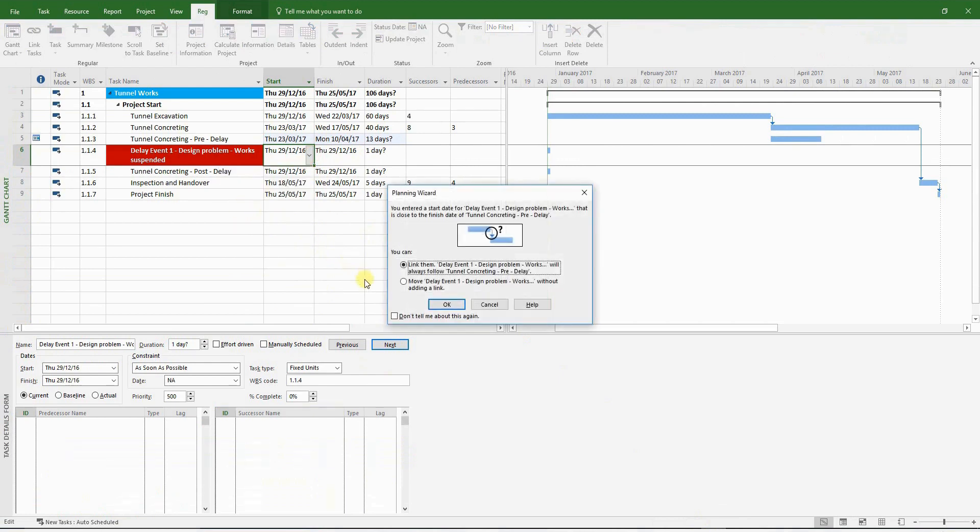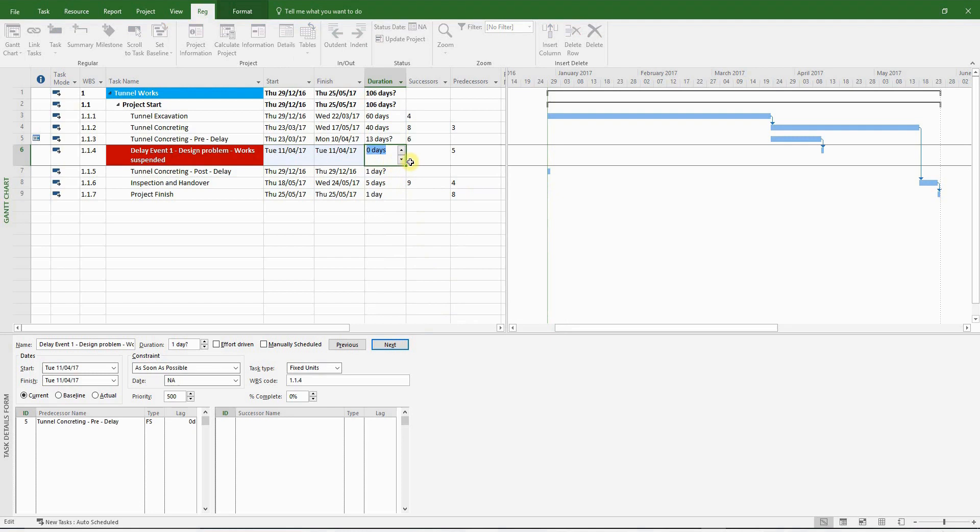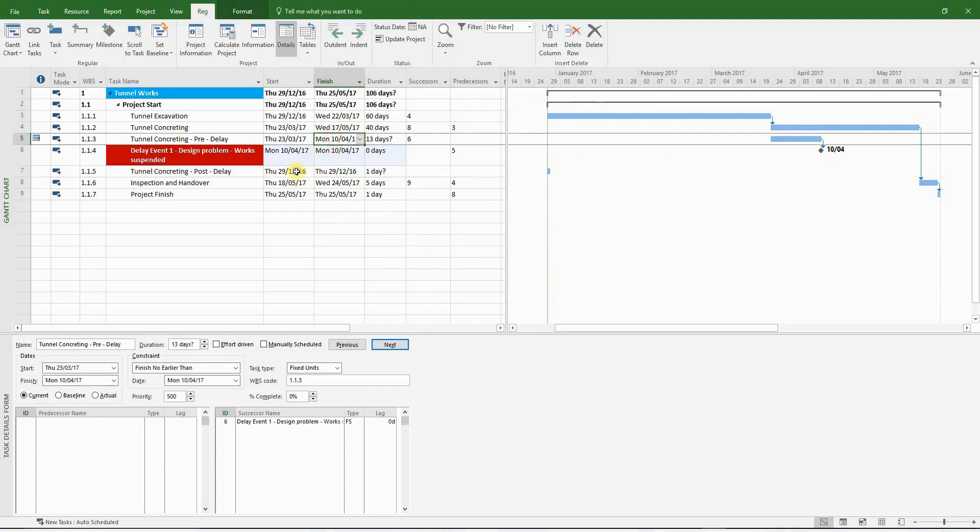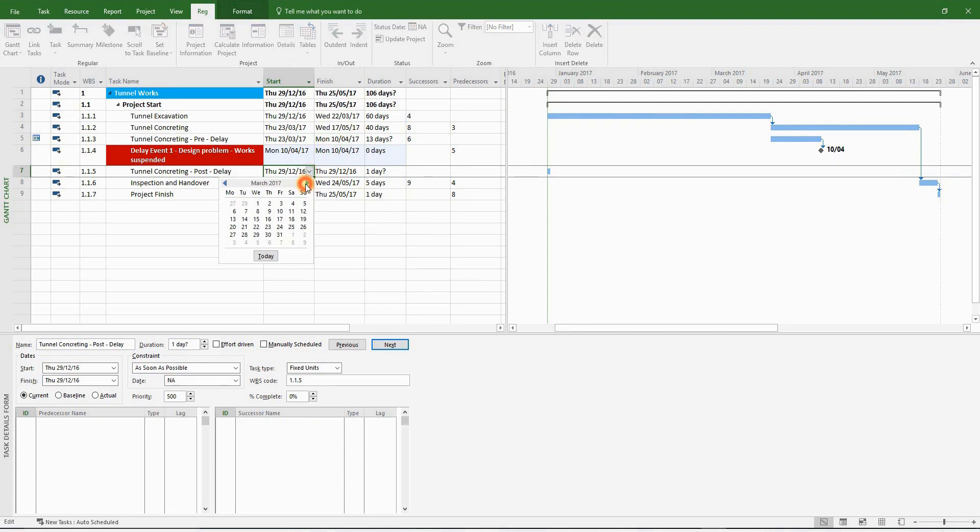When you see this pop-up menu, please make sure that you click OK to the first auto-link option. This is just how MS Project works. You have to be extremely careful and cognizant of these pop-up menus. For the moment, I'm going to convert this delay event into a milestone. Now we have to set the start date for the tunnel concreting post-delay. Obviously, it should start straight after delay event number one. So it should be the 11th of April 2017.